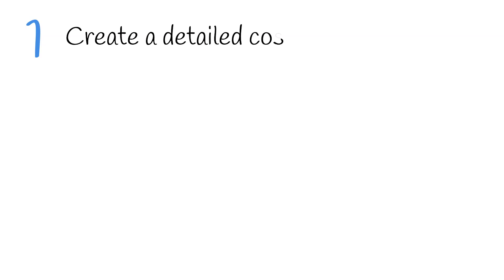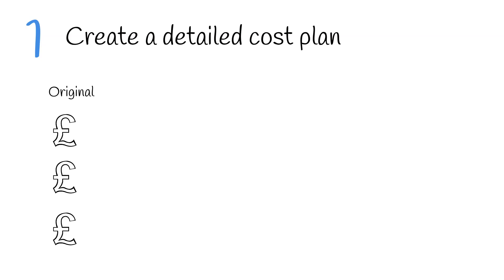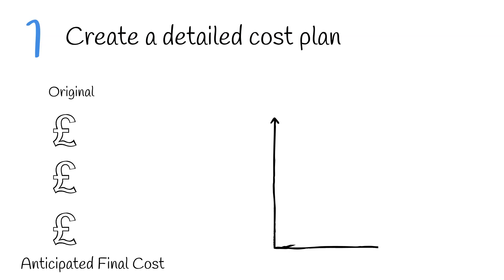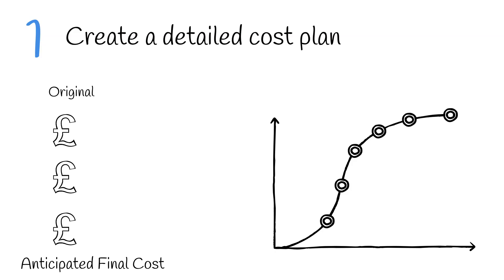The first tip is to create a detailed cost plan. A detailed cost plan provides a breakdown of the project budget estimate. It's essential for effective cost management and can be used to track value and spend on a project against the anticipated final cost. It usually includes a forecast showing anticipated spend on a project from start to finish, which is then used to compare movement and spend month on month with the original forecast.